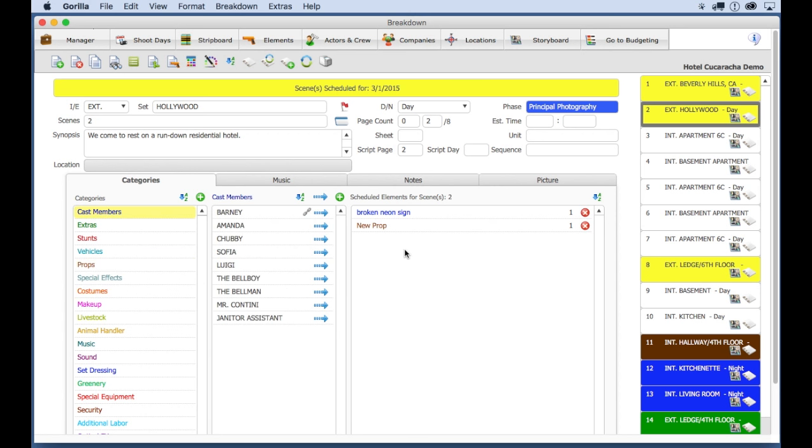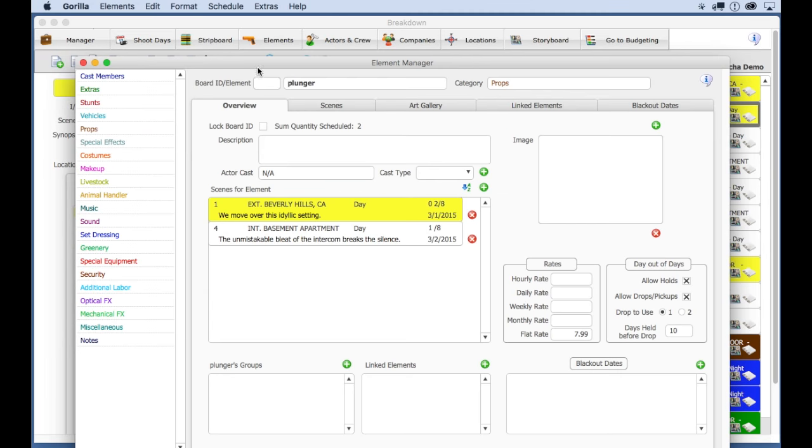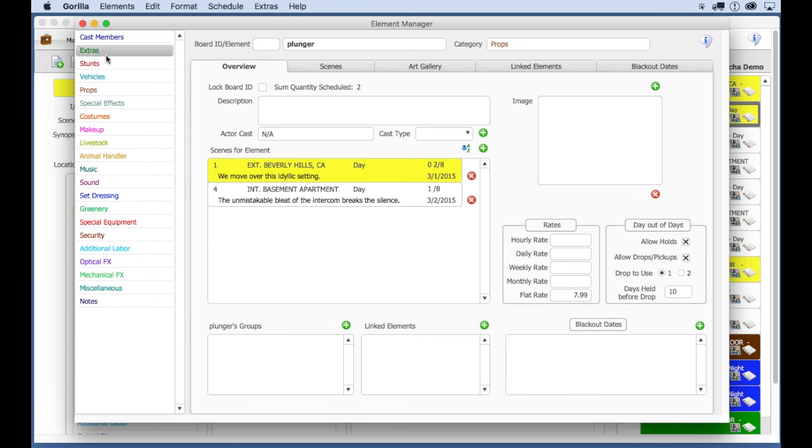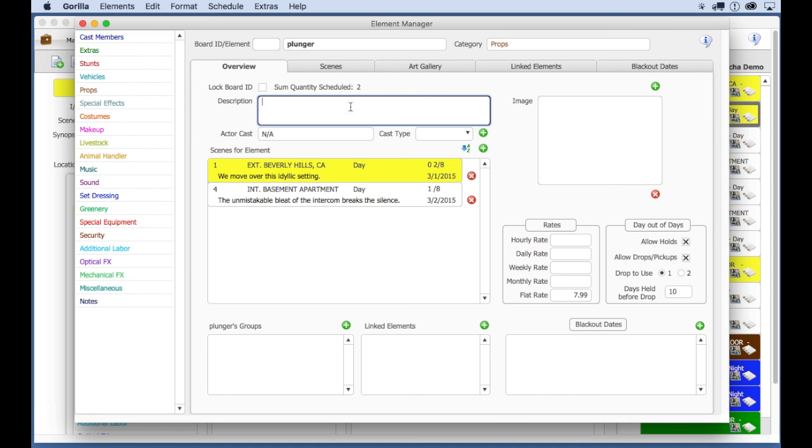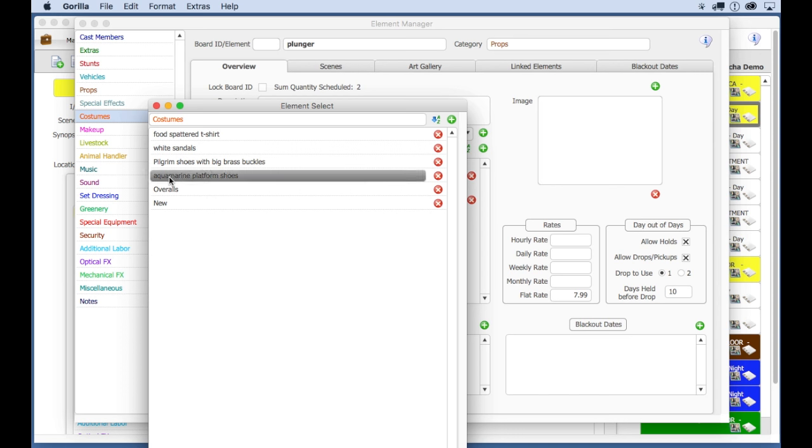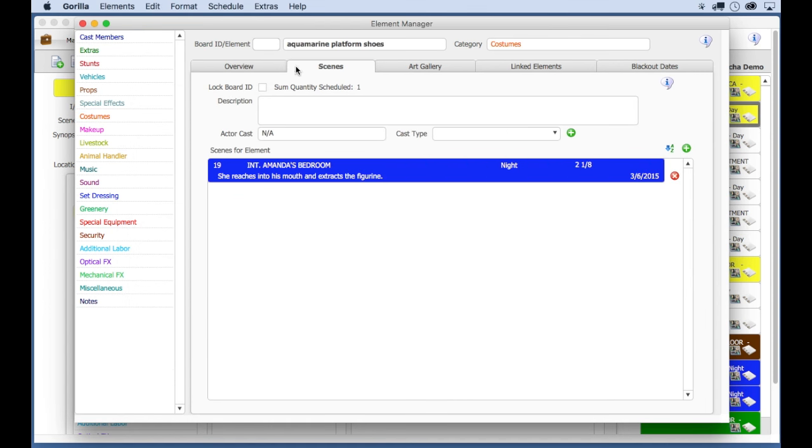To manage all these elements, click on the Elements button. Notice the same list of categories here on the left. Here, you can add detailed description, import an image for that prop or costume, and add scenes to that element, which is kind of the reverse of what we did on the breakdown sheet.